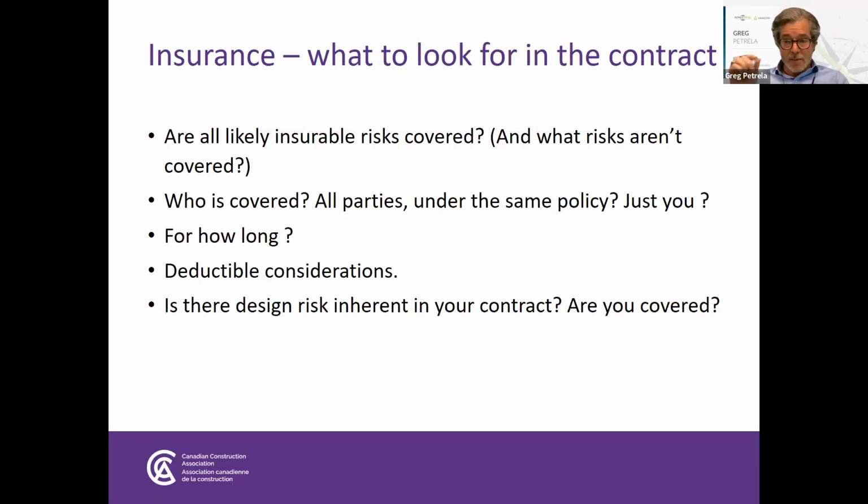Subcontractors can, on a blanket basis, arrange for coverage for those sorts of deductibles, because what will happen is there will be a leak, and that leak will cause damage to carpeting, to drywall, to flooring, to maybe electrical apparatus and whatever. And the builder's risk policy, this is during the construction project, the builder's risk policy or the wrap-up policy, one of these two policies will pay for the damage, and then somebody will be responsible for the deductible.